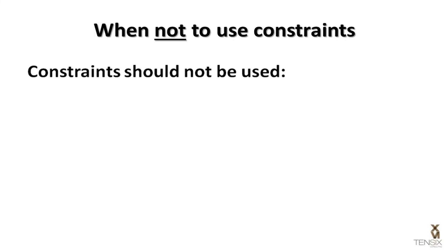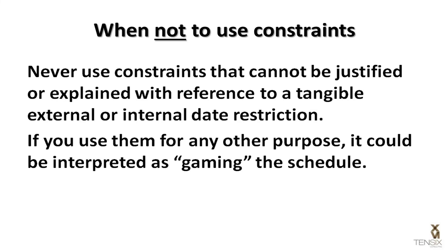In the end, it all boils down to something very simple: never use constraints that cannot be justified or explained with reference to a tangible external or internal date restriction. If you use them for any other purpose, it could be interpreted as gaming the schedule.